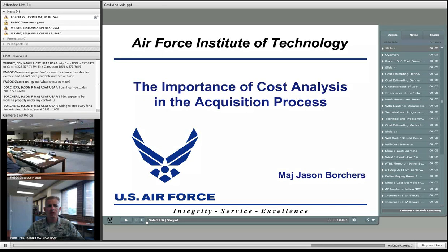So you might see from year to year, say you're on the A10 program and you need to do a cost estimate from year 1 to year 2. You're going to take a look at your mission. If you know your mission is similar, and you're getting ready to come up to year 2, and you know what your costs were for year 1, you may use those costs in year 1 as a baseline for year 2, applying inflation or something like that.